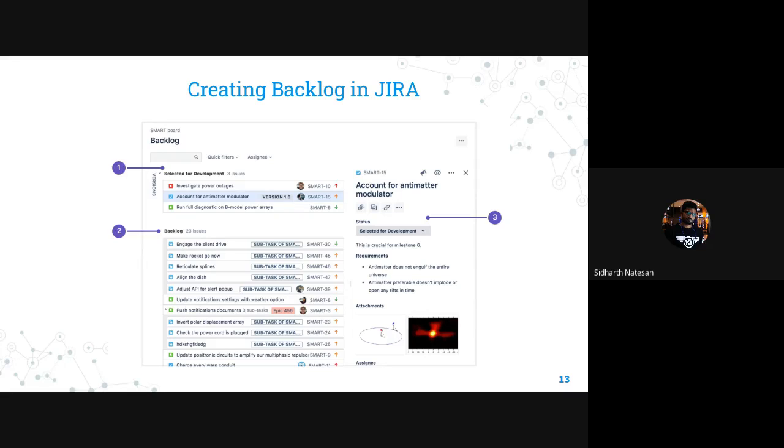You have to add your acceptance criteria, your test case documents, and the attachments that are needed to get the work done. The files, everything has to be attached into the description of the particular user story, so that as a developer you will not find difficulty in working on this code. Everything will be here. At the end, to make sure I'm achieving the acceptance criteria mentioned at the bottom. I'll give you some real-time examples for this.